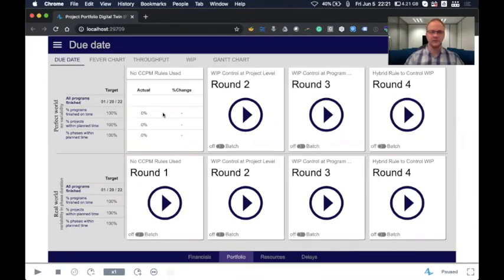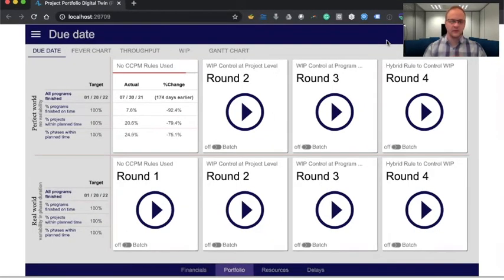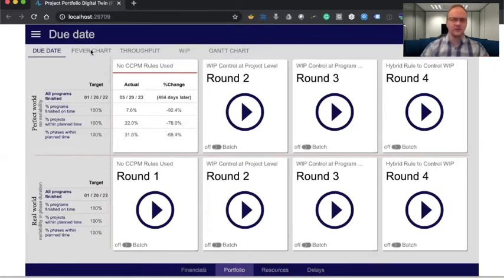For this, I'm just quickly going to view the first round — this is going to be a perfect round without any variability. As we let the model run, we'll be able to analyze the due date performance. As the model is nearing completion for our first round — the perfect world with no variability — we are able to see that we are slowly eating up the days available before we reach the end of the planned days, and we are already late. Most of our programs have not finished on time, the projects are not finished on time, the phases are not finishing on time, and this is all with zero variability — mostly due to using the traditional project management rules.